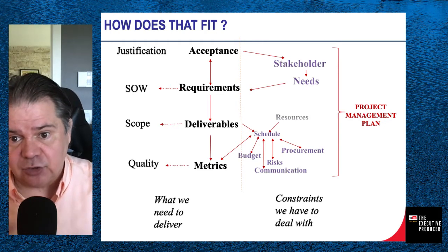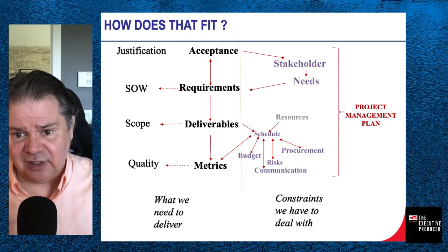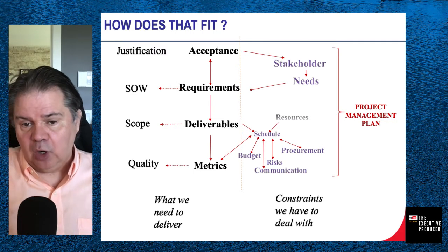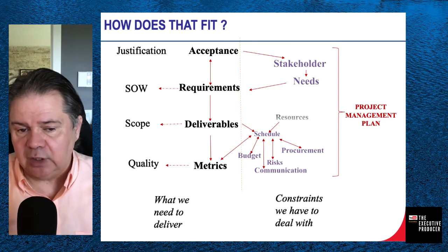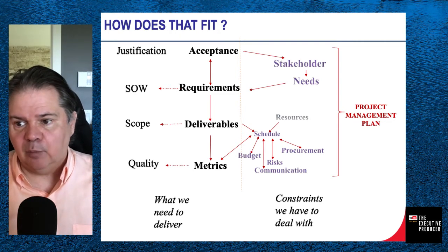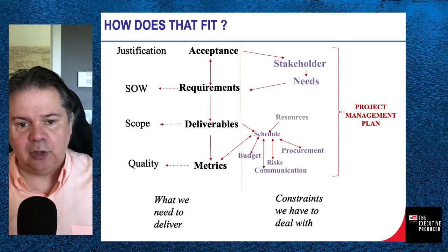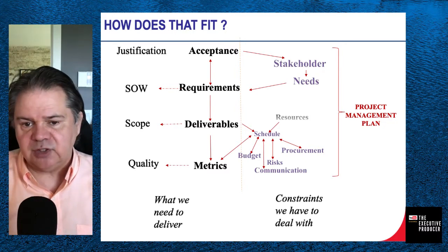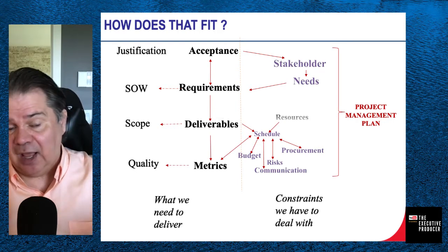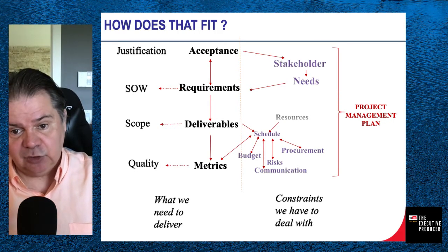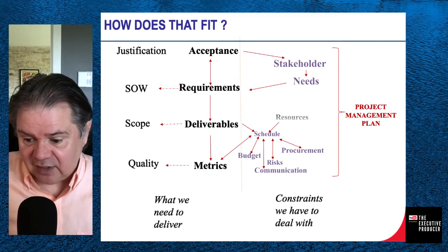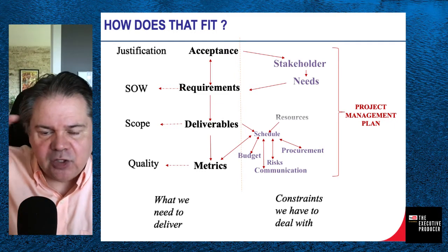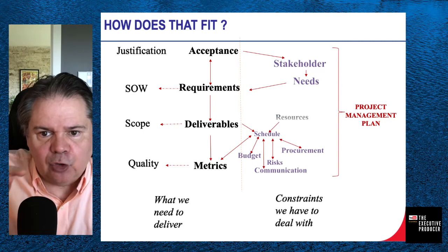You might realize also that we might have certain deliverables that we didn't expect, when we work the quality, and we might have to go back into the deliverable because, for example, we realize one of the standards is to provide an FMEA report, which is a failure mode analysis report, to the customer. Well, we didn't know that, so now we have a matrix that's just saying we need to do all the FMEA testing. So now we go back into scope and add FMEA report, okay? So now we have a report to produce and activities to generate that. So you could start to see now, right? We're kind of turning, right?